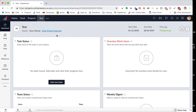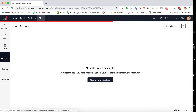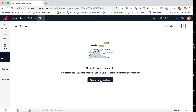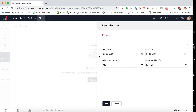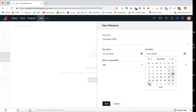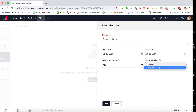The first thing I would do within a project is set the milestones. Milestones are the big sections within the project. I break this down in a very simple way — I do it by month. So the first milestone would be December 2018, starting on the 1st of December and ending at the end of December. You can set it as internal or external, and assign who's responsible.